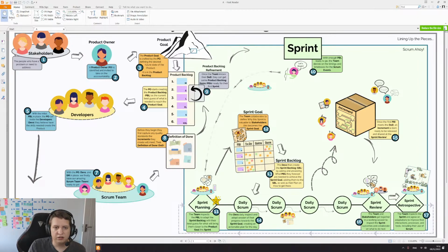Now that they know where the finishing line is for any individual work item, they can start refining the product backlog a bit more during product backlog refinement. And again, the Scrum team works together, maybe even with the stakeholders, to refine some items to a state of readiness, where we can consider a product backlog item, a PBI, ready. Ready just means it fits within a sprint, or rather we think it fits within the sprint. It is after all complex work, so we don't know for sure. And I even like to say fits easily within a sprint, we think.